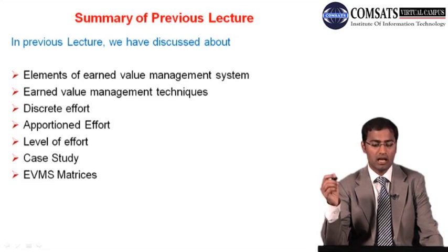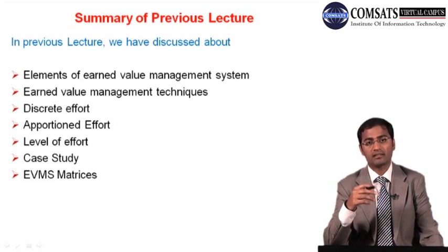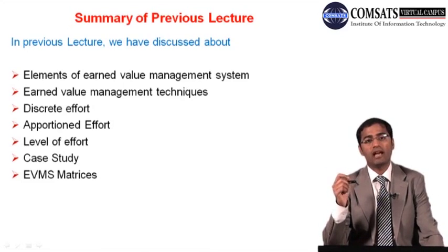There was a table with schedule indices on one side and cost indices on the other. If SPI and CPI are less than 1, our project is behind schedule and over budget.